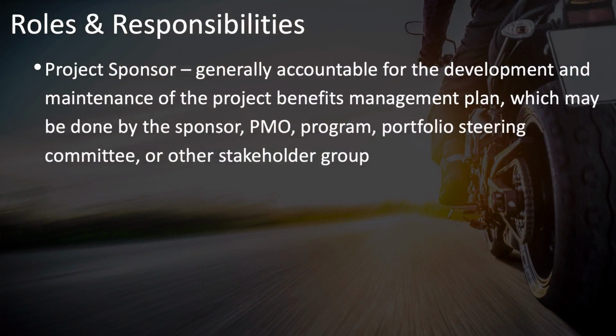The project sponsor is the one who is accountable for the development and maintenance of the project benefits management plan, which may be done by the sponsor, the PMO, the program, the portfolio, or any other stakeholder group. Notice that this is just like the project charter. The project sponsor is accountable, but may delegate this and very often does.